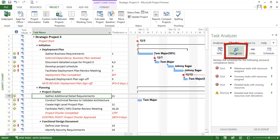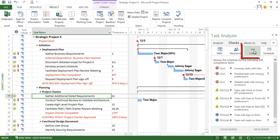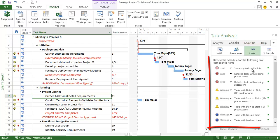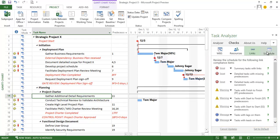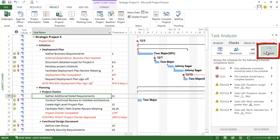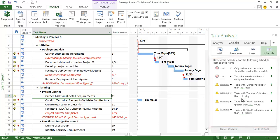Similarly we have resource checks such as milestone tasks with resources assigned, summary tasks with resources and so on. We also have link checks, summary tasks with links, detail tasks with missing predecessors and successors and so on. And we have schedule checks. And throughout all of this you can set the options as to what it is that you want to check for in your particular schedule.